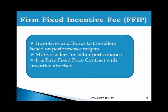Fixed price with incentive fee (FPIF) is a variant that gives some incentive to the seller based on performance targets. We start with a firm fixed price and then identify performance targets, which could be linked with cost or delivery time. On the basis of the seller's performance meeting those criteria, the buyer and seller agree to a bonus. So the seller can claim the incentive if he meets those performance criteria.